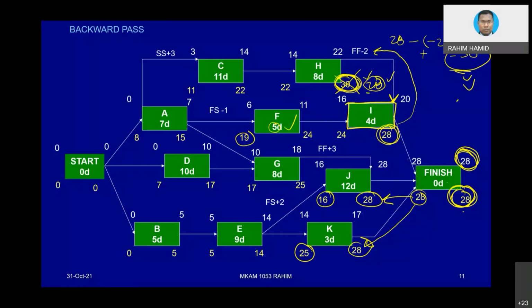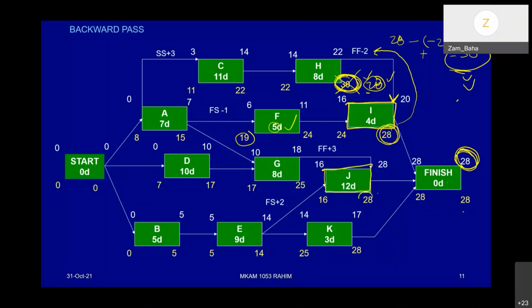Then how about J and G? Okay, now let's take a look at J and G. It looks like almost the same issue, but how come G is okay? Okay, now let's zoom in into J. So in this case, if we follow the formula, we get 30. Yes. But because we cannot go beyond 28, we should default as 28 as well. Yes. Ignore. Oh, okay. Yeah, that is the point I'm getting. Okay, and you know what?